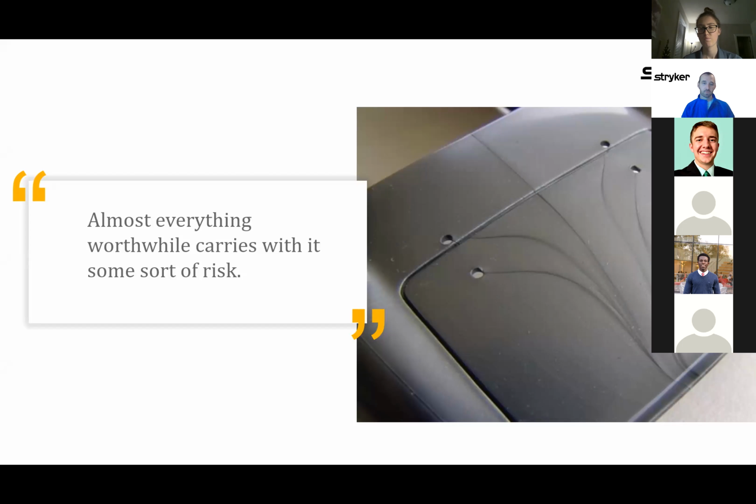They just say, "Oh crap, this happened." And one project I saw in the business, they had multiple tool failures, and it delayed their entire project by over a year. And that was a new technology, so that cost a ton of money to the business. But at this time, we ordered an extra set of all the parts, so we were able to smooth right through. It didn't cause us a single delay. It was beautiful. And the best thing is, it kind of went under the radar. It was almost unrecognized, because it was so smooth, and we were aware that it could happen and planned for it.